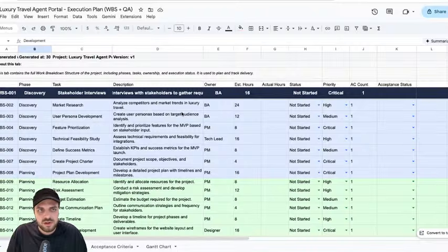And then as well, for scoping the project and to make sure everyone is happy, both the developer, the builder, and the client, you would need to create this WBS. Just break down all the tasks. You will be able to report much easier about the current status, on which step you are at the moment, and, depending on your agreement, whether it's a fixed price or time and material, be able to transparently provide the information which is needed on time in order to remain or increase the scope.